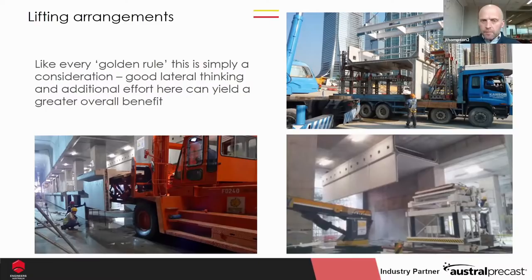OTEs were a lot more difficult. This was a bespoke engineered unit that took about 14 months total from concept to creation. All you had to do was land the precast unit on top of that, then it would jack it to the ceiling, up to the threaded rods, and then operatives would just tighten those threaded rods. So again, very much worth the investment.